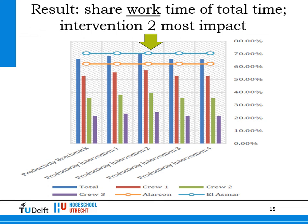And transferring to other buildings, because that's the interesting part of this modeling exercise. It's not a one-off modeling exercise for this building. If you import another BIM model, you would be able to do the same exercise, or use different elevators with different speeds. It's all import data which we could change, and per project, in the BIM phase, because this project is already running, we could optimize where staircases, elevators and all that should be in order to save walking and waiting for the workforce, and thus improve the share of working time per day. So that's about it. Thank you for your attention.